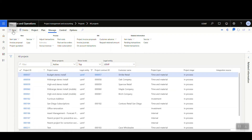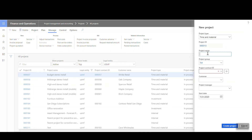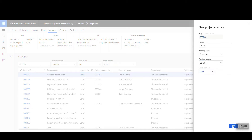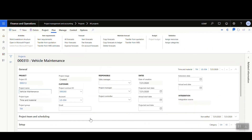Let's dive in and start from the very beginning. We'll create a project from scratch, add some item requirements, release those to the warehouse, and then invoice it out. I'm going to create a new project — the project name will be 'Vehicle Maintenance.' For the project contract ID I'll create a new one called US-004, the funding source will be customer US-004, and the sales currency will fill in automatically.